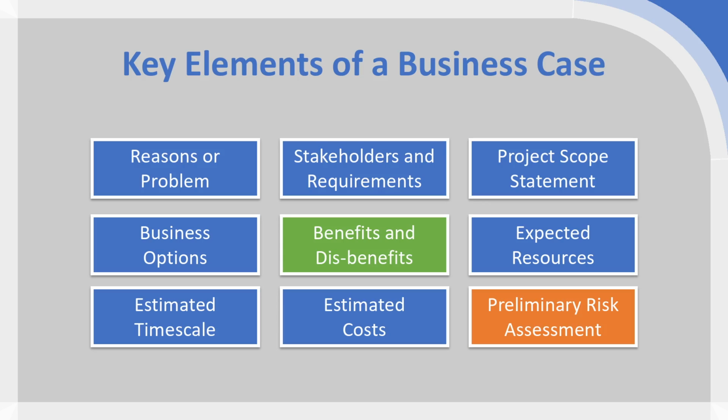So if you think about the disbenefits of our renovation project, well, while we're carrying out the work to renovate room A305, no one's going to be able to use it for 3 weeks. And instead, we're going to have to find rooms for those classes in other parts of the campus. So you see, that's not actually a risk. That's not a project gone wrong. It's an expected negative outcome from a successful project.